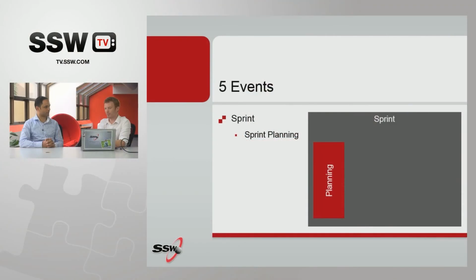So this actually has a name. It's called flaccid Scrum, where you're not delivering anything. So the cure for flaccid Scrum is not Viagra. It's to shorten your sprints and to go down to a 1 week sprint and take less items on board. So we'll move on to that, what you were talking about before, when we move on to now the sprint planning. Okay, so the sprint planning meeting is where you get together.